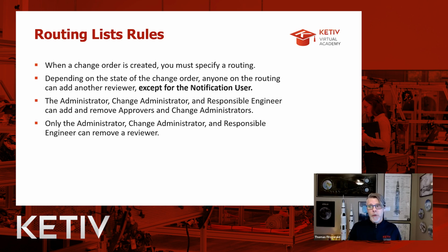Depending on the state of the change order, anyone on the routing can add another reviewer. Okay, remember, reviewers are only seeing what's going on. They're not really interacting too much with the change order itself. So anyone can add another reviewer except the notification user, because really they're only going to get a message if that change order is canceled, right?